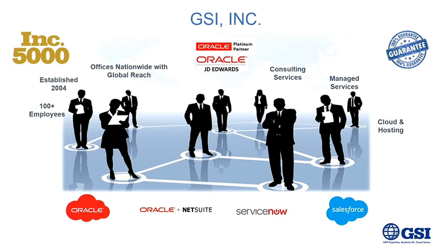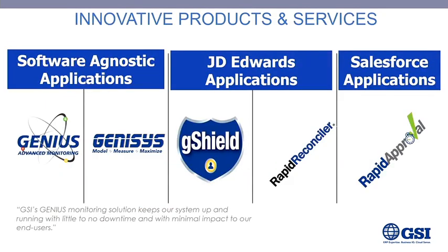Sometimes we have people do a single-step approach, but Federal Signal had a need. They needed to get off of their current provider. I don't know, for those of you that have been on a cloud, if you miss your mark, sometimes you're faced with a 6-month extension you weren't necessarily expecting. And so we had to hurry up and make sure we got over, and that's what broke it into two stages. So we have a couple of products.